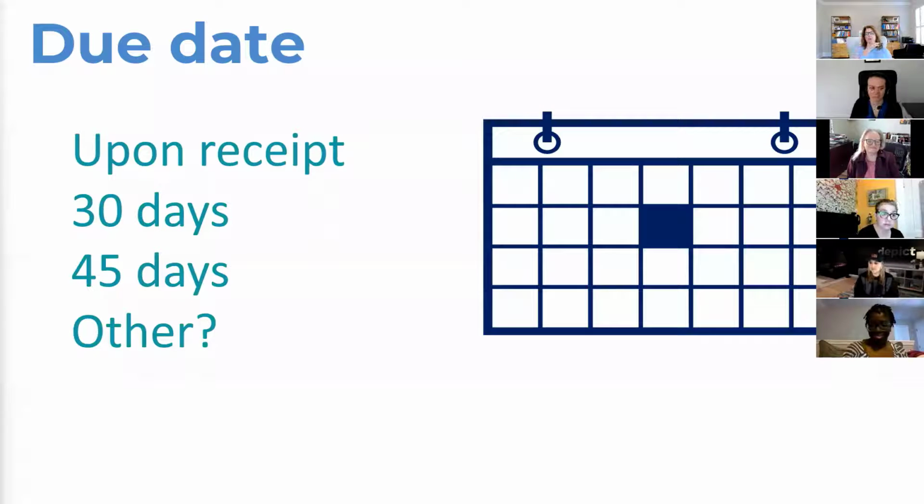All right, so then think about due date. Are you expecting to be paid upon receipt, 30 days, 40 days, 45 days, or is there some other schedule? We use QuickBooks, and we almost always say 30 days, unless the client says, no, we need that to be 45 days for whatever the reason is. And I'm not gonna be upset about 15 days.